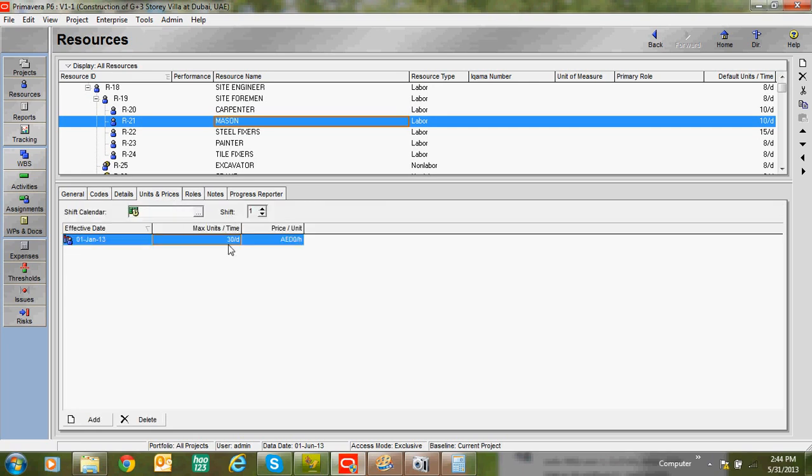And the maximum unit and minimum unit vary, giving some 20% difference, because in the initial stage of the project we normally need fewer manpower, and in the middle and end of the project we need more resources. That's why we key in minimum resources here and maximum resources out here.